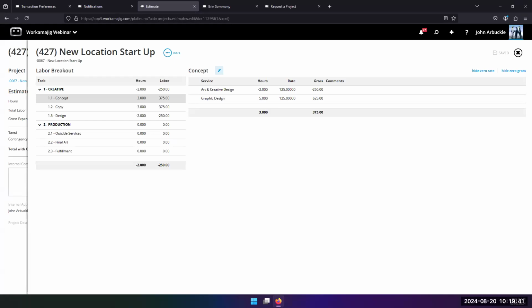Okay. Then the question comes up, well, if we restrict it to have only one estimate per project, how would I do that? Yeah, I can't have a change order if you're restricting it. So then you're saying, well, now I have to version it. So you're unapproving that estimate, making changes, and then resubmitting it, resending it to the client to get sign off on it.